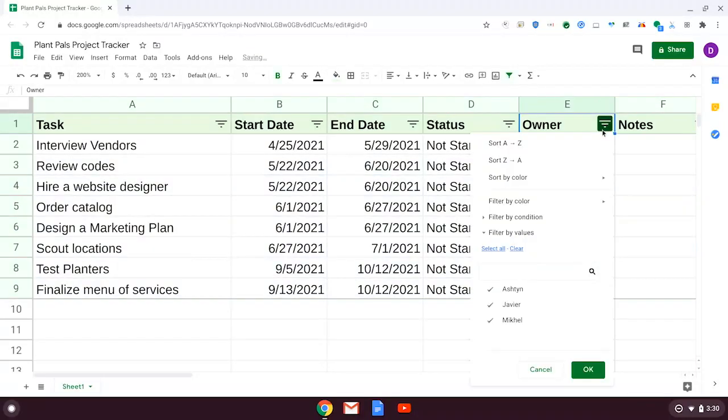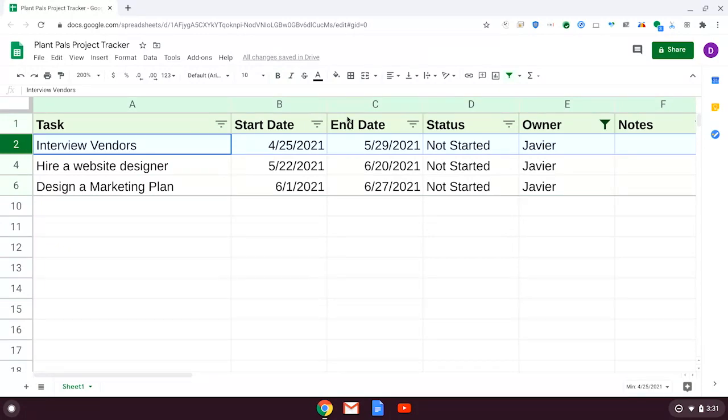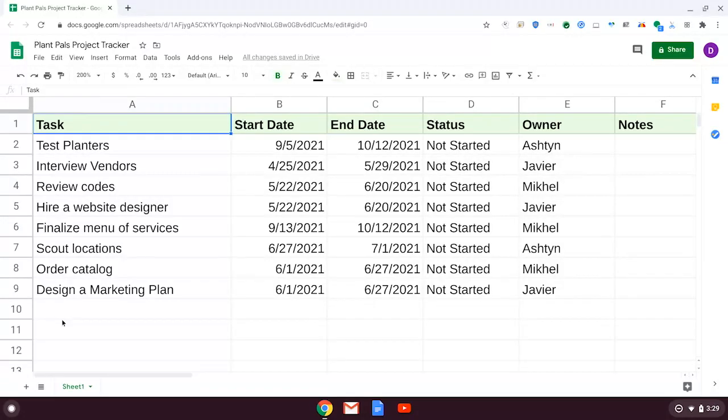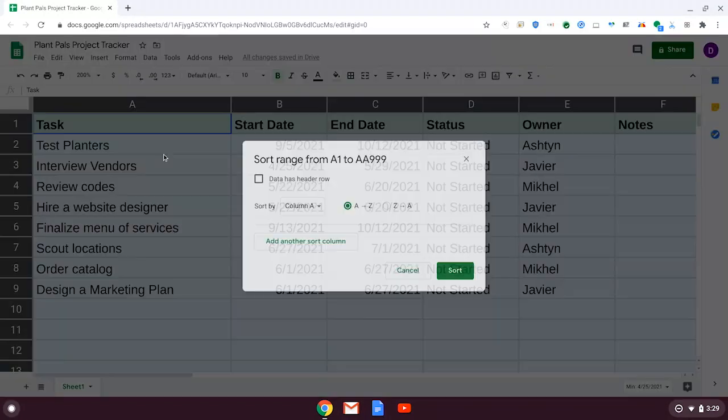Another great tool we'll focus on throughout this program is the spreadsheet. Spreadsheets are extremely versatile, and you can use them for a wide range of tasks, from creating timelines and building charts to managing budgets and tracking tasks. You can add and view project information in a variety of formats depending on what you need in the moment. For example, let's say you enter a list of tasks, due dates, completion statuses, and task owners into a spreadsheet. From there, it's very simple to sort the list by due date to see what's due next.